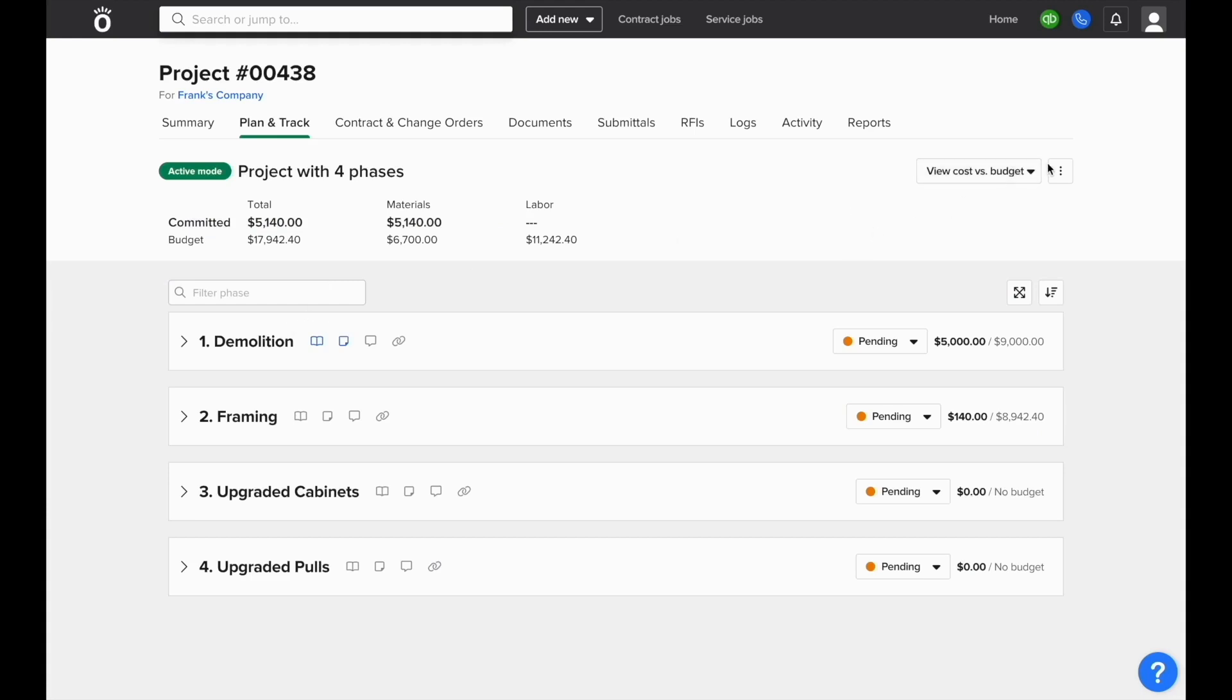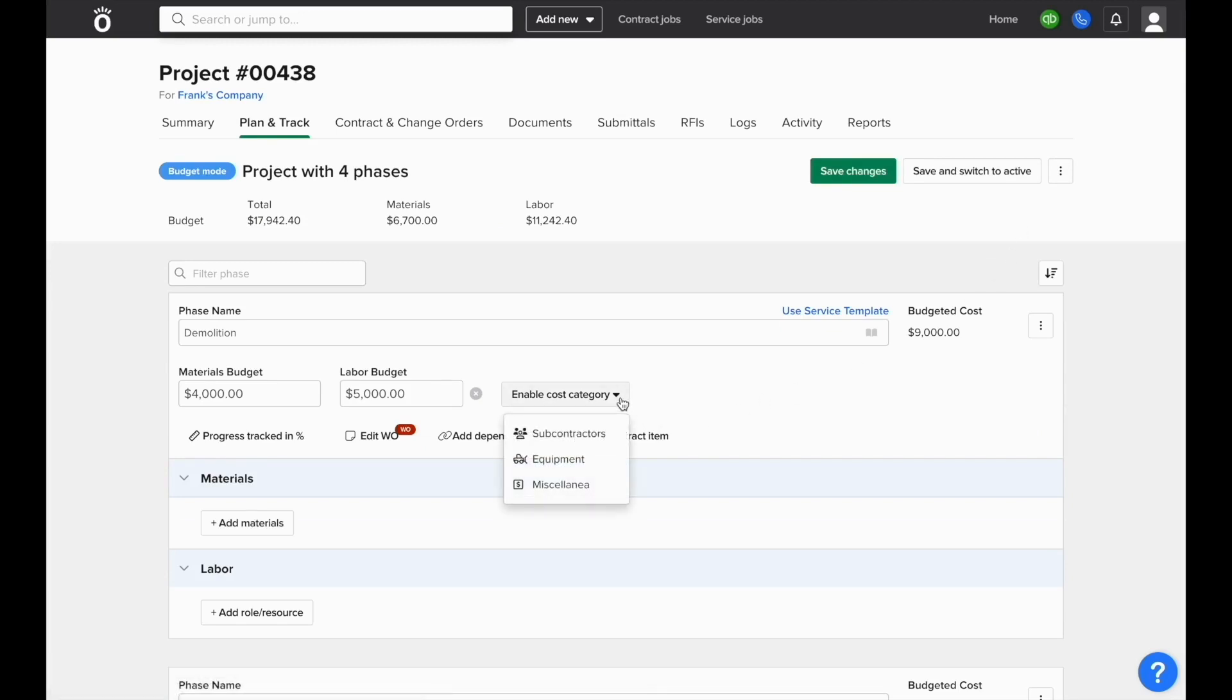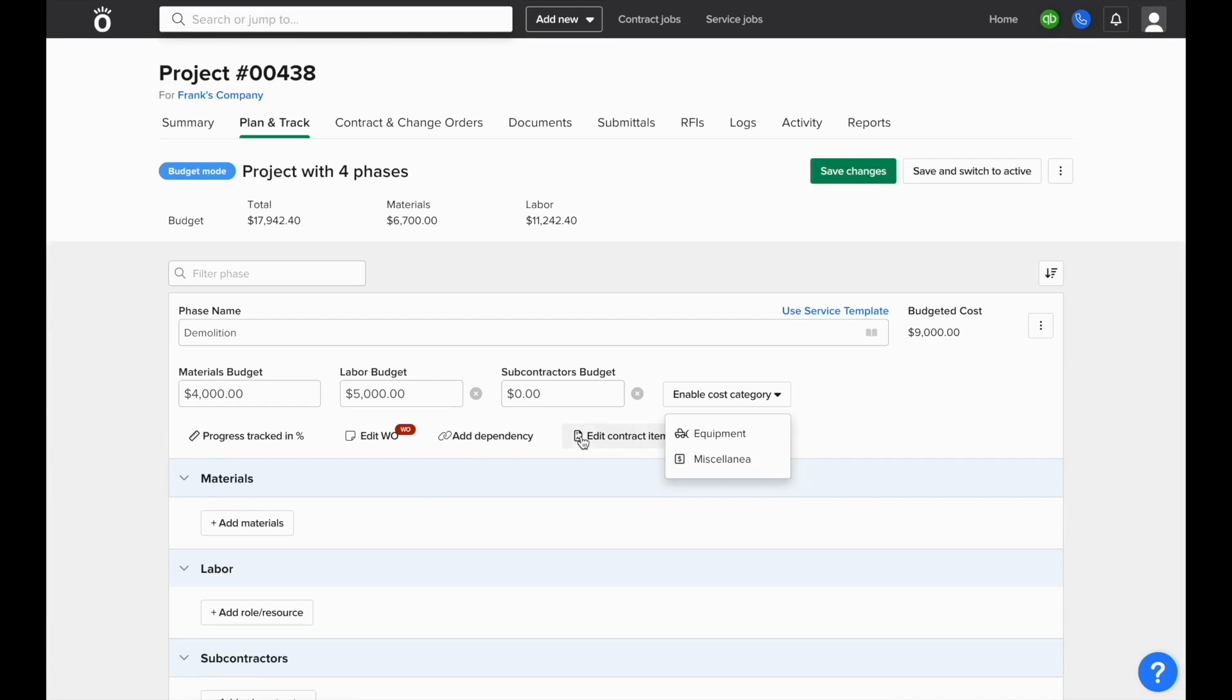We'll want to make sure that the specific phase that the subcontractor is working on has subcontractors enabled as a cost category. If needed, we can also enter in a subcontractors budget here as well.